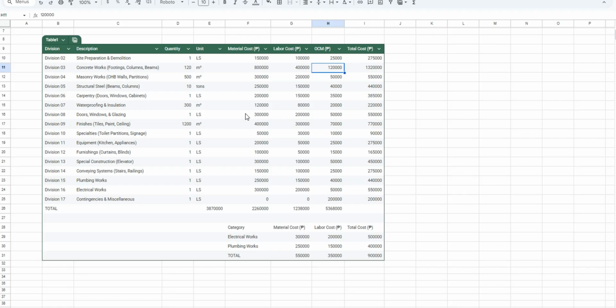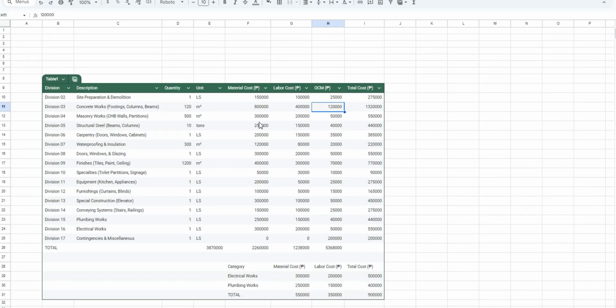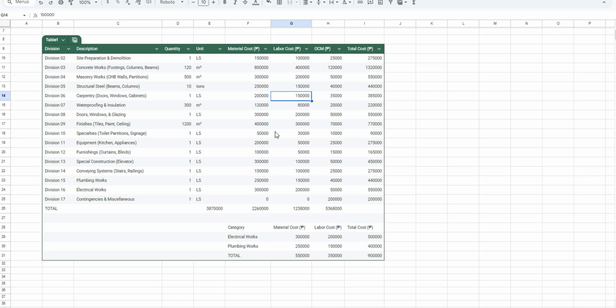So these ones are used for easy transaction, especially if you already have standard inclusions. You can use the per square meter. But if you're still starting, of course, you don't have much construction experience, you don't know how much you work, your project management, and your overhead costs, meaning to say, do you have a truck? Do you have heavy equipment? Are you sufficing the employees for 1 month? How many employees, engineers, architects, and admin do you have? Then you can increase your cost depending on those. But if you're working alone as direct supervision, it's automatically lower. But then you should break all of these down, because this is where scam happens.